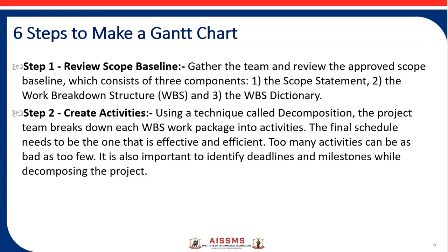Step 2, create the activities. As the WBS is already created in step 1, using the same work breakdown structure, we'll use a technique called decomposition. The project team breaks down each WBS work package into activities, and the final schedule needs to be effective and efficient. So we can't create too many activities or too few.